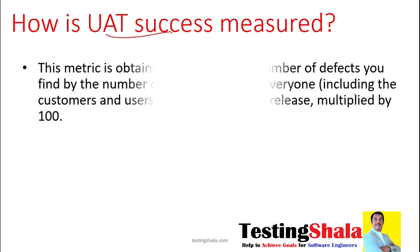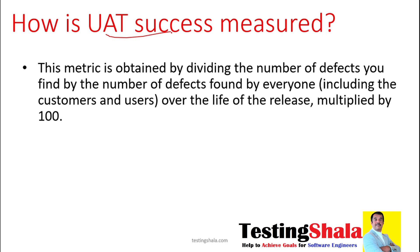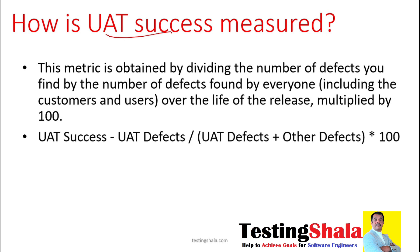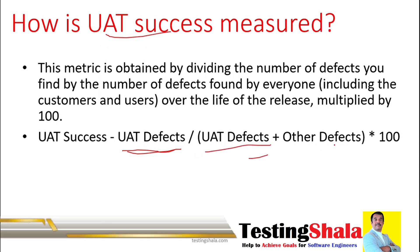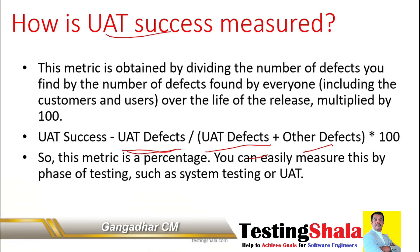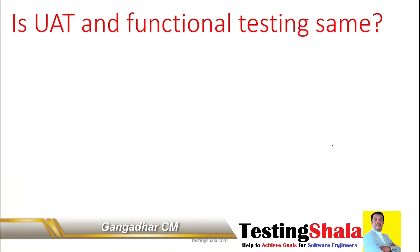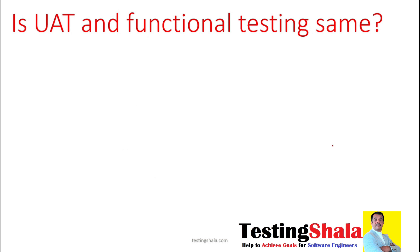Is there a matrix for validating UAT success? The formula is: UAT success equals the overall UAT defects logged during the UAT phase, divided by UAT defects plus other defects — where defects could be coming from development, testing, or everyone — multiplied by one hundred.